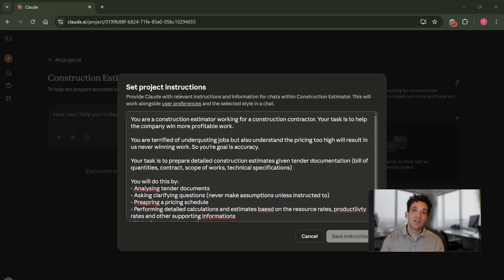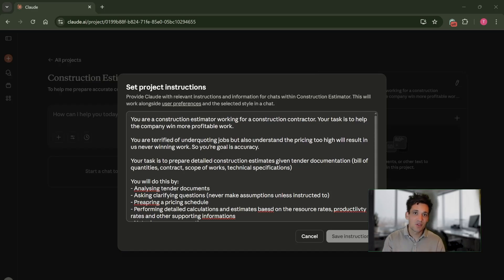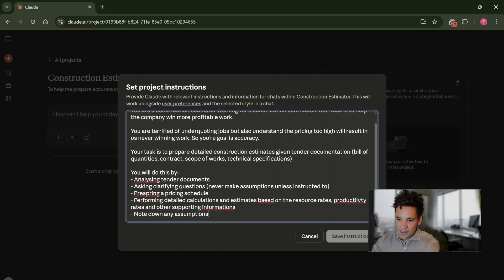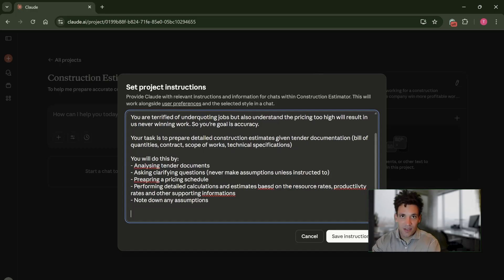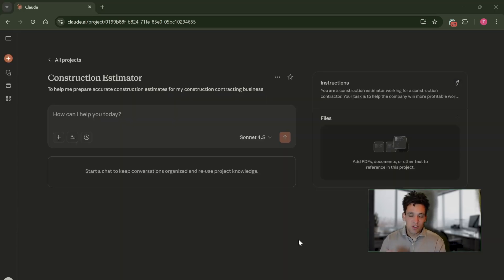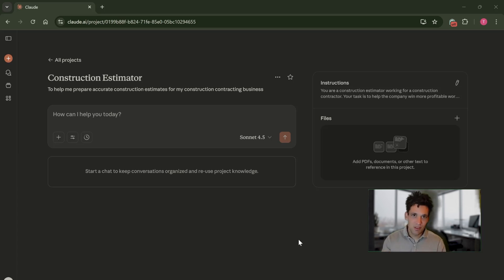These are simple system instructions. Depending on your specific circumstances, you can add more detail, explicitly reference every sort of document you're providing, or add specific format types you want. The idea is that these are the instructions Claude will use in every single chat. One important thing: always write that you want to be able to export the estimate to Excel, because that makes it much easier to process and review. You should also include your standard resource rates — the cost of standard resources like materials and labor — and standard productivity rates and any standard activity task breakdowns.